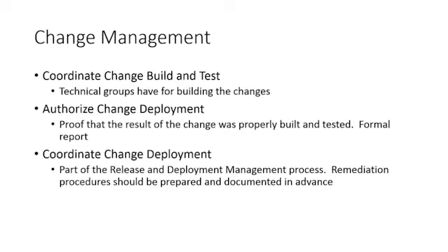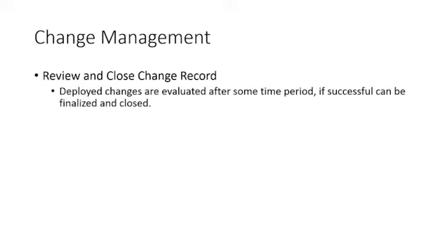Coordinate the change. We can put some remediation procedures in place if we need to, because best laid plans, right? We've planned it. We've gone through the process of change management. We've had more eyes on it, more opinions on it. They've given the stamp of approval, but we implement it and something happens that was not intended. Have a remediation plan in place, just in case. It's always better to be safe than sorry. You hope for the best and prepare for the worst.